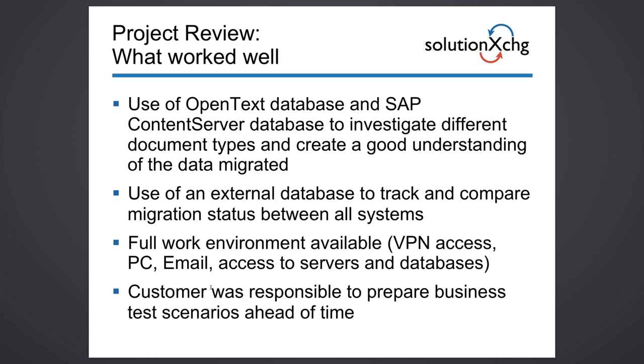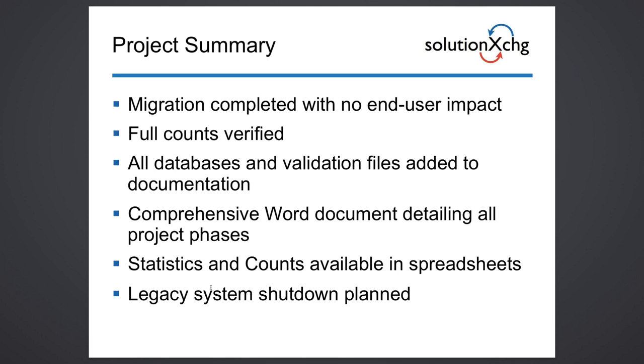And of course, what is always important is, and we had that lesson here again, the customer has to be responsible for the business test case scenarios, because we are coming in as a specialist from the outside. We don't know the customer's business cases, even though the business cases are not impacted by this specific technique of doing a migration. Still, we need to verify the specific business cases, and we need knowledgeable people within the organization that know how to retrieve a financial document, a sales document, a workflow document, and so on.